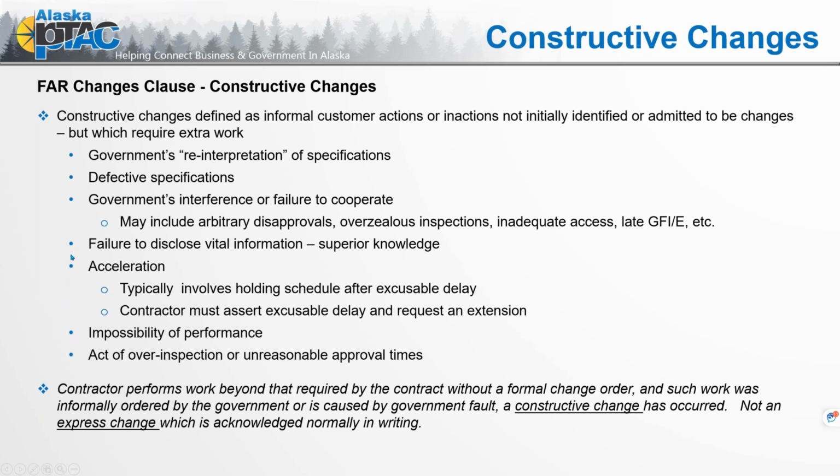What am I doing for time? Okay, so I'm not going to spend a lot of time on this, but constructive change is defined as informal customer actions or inactions not initially identified or admitted to be changes, but which require extra work. Constructive change: government's reinterpretation, defective specs, government's interference or failure to cooperate. So something happened that created or caused this change. It is a constructive change, and this terminology is important.